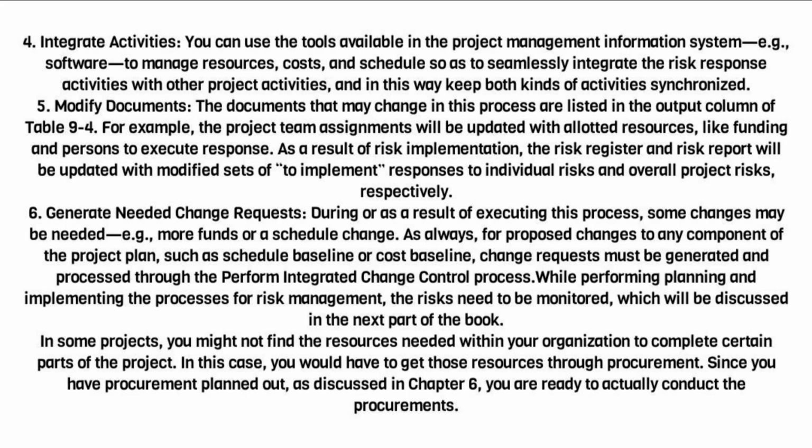6. Generate needed change requests. During or as a result of executing this process, some changes may be needed, for example, more funds, or a schedule change. As always, for proposed changes to any component of the project plan, such as schedule baseline or cost baseline, change requests must be generated and processed through the Perform Integrated Change Control process. While performing planning and implementing the processes for risk management, the risks need to be monitored, which will be discussed in the next part of the book.